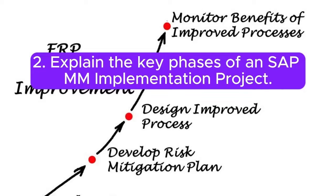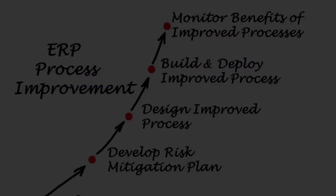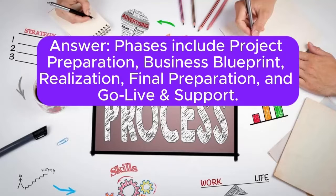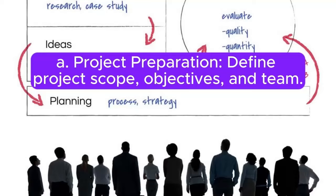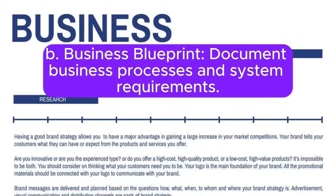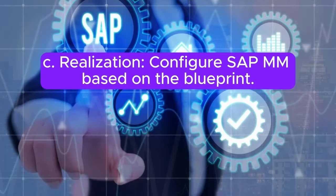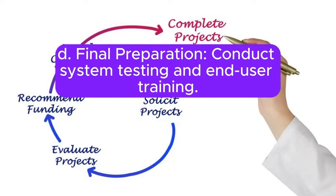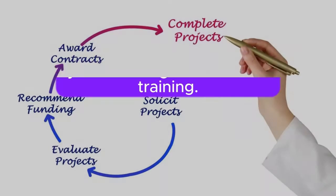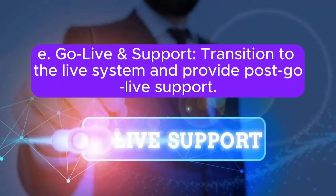Question 2: Explain the key phases of an SAP MM implementation project. Answer: Phases include project preparation, business blueprint, realization, final preparation, and go-live and support. A) Project preparation: define project scope, objectives, and team. B) Business blueprint: document business processes and system requirements. C) Realization: configure SAP MM based on the blueprint. D) Final preparation: conduct system testing and end-user training. E) Go-live and support: transition to the live system and provide post-go-live support.